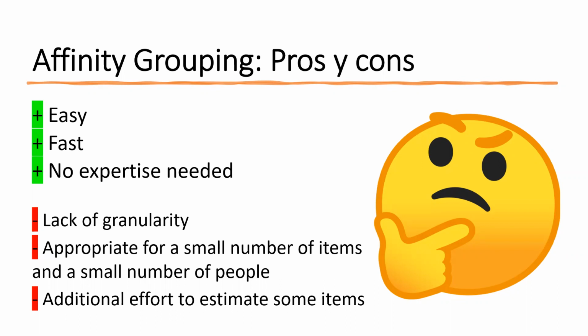Okay. Yeah, I'm on the dev team, and I actually have a waterfall background, and I know a little bit of Scrum. But in waterfall, we work off requirements, and we make a technical specification where we study the implementation approach we want to use, and we make scopes and estimate based on a detailed study of the technical specification.